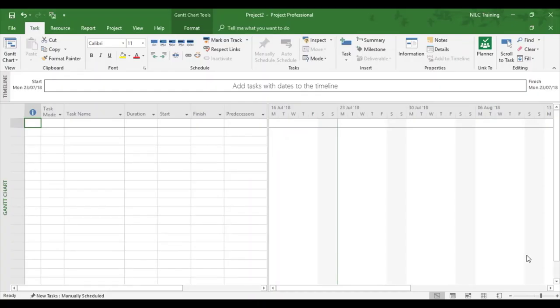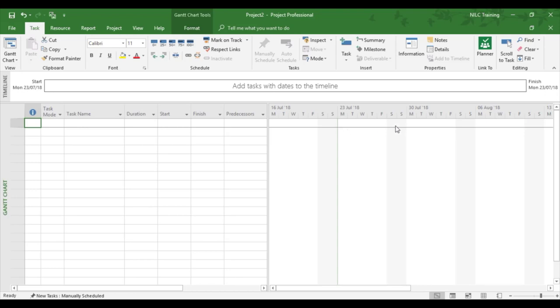In this training video, we're going to look at customizing the calendar for Microsoft Project to make sure we set project up the way we want it to work. So in this example, if we look at how project is set up by default, it works from a Monday to a Friday, and then the weekends happen to be Saturday and Sunday.